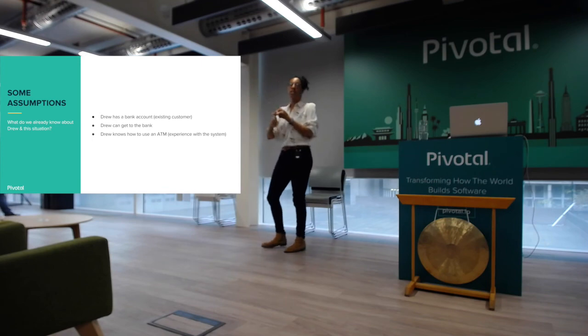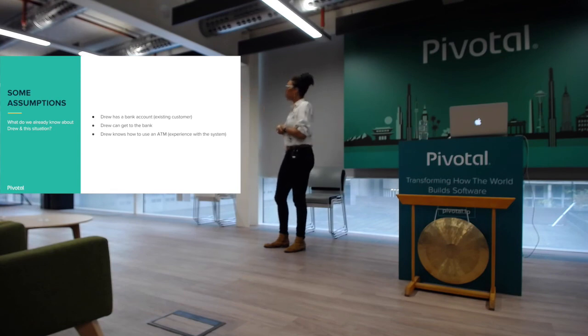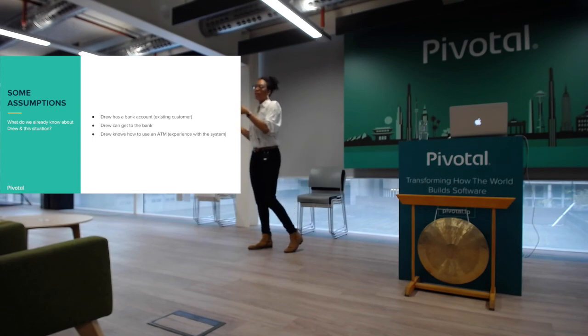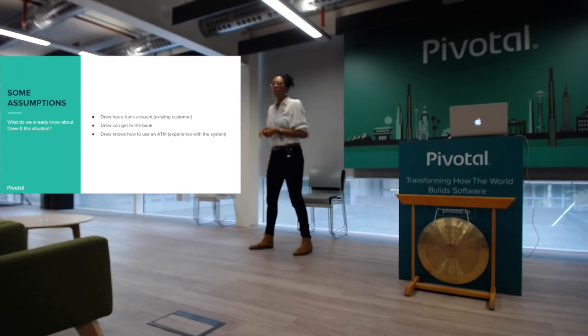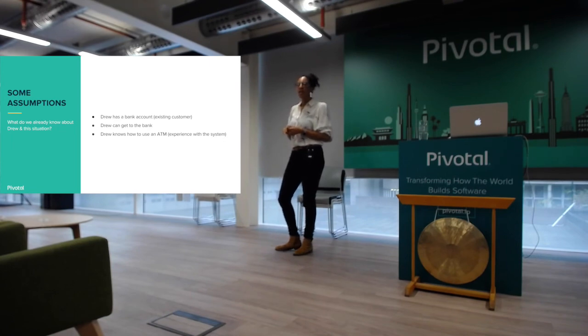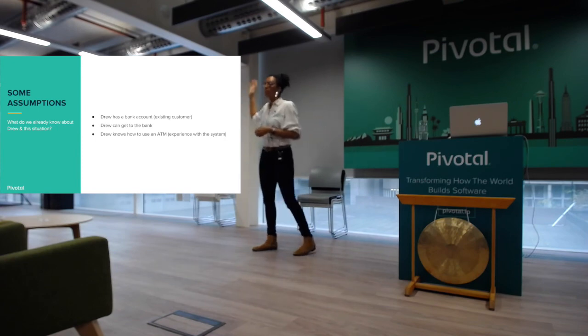So call out as many constraints as you can think of. Obviously, as you continue to build, you can add more as questions come up. But you do that before you even start building the map. And oftentimes what you'll find is if you don't have enough clarity or you can't get down to the point where you can actually title it, you probably haven't done enough work beforehand to say we're actually only building one thing. You may be looking at too many things at once. So definitely before you even start building the map. And this normally takes at most maybe 15, 20 minutes. If it takes longer than that, you probably have a problem. But if you're really clear on what you're doing, 5 minutes tops.